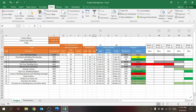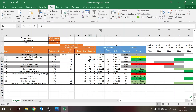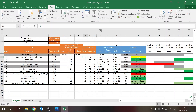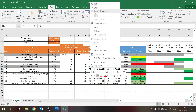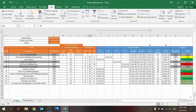In this case I connected this task to the Wedding Budget as a Start-to-Start with a lag of one. You can see in the auto schedule that it starts on the 3rd of January, and since it's Start-to-Start with a one-day lag, it starts on the 4th. I changed it to different values and you can see that dates shift dynamically as you do that.